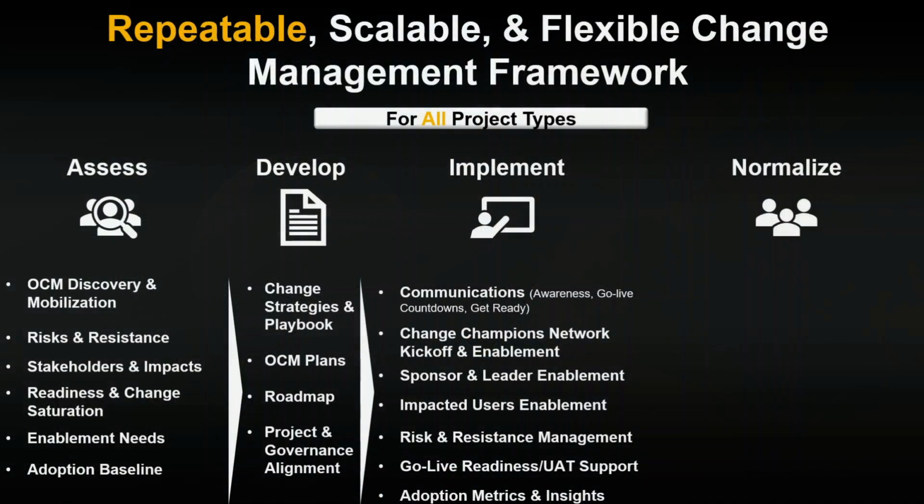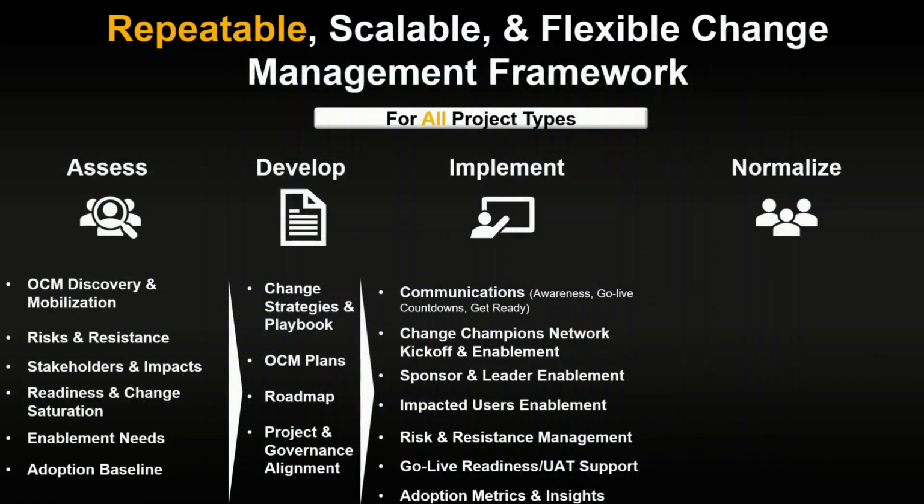For example, as part of your change management assessments and findings, you might need to start communications right away during the assess phase, in which case you will not want to wait until the implement phase to start sending out communications.